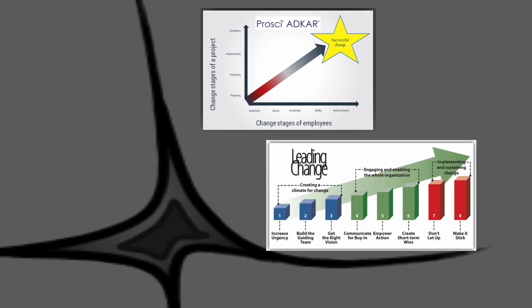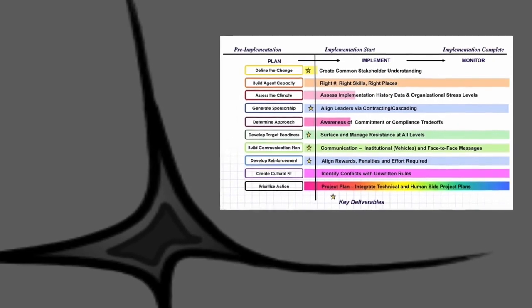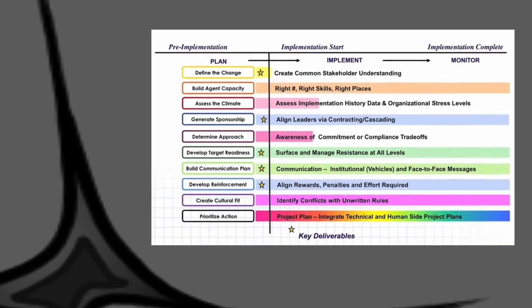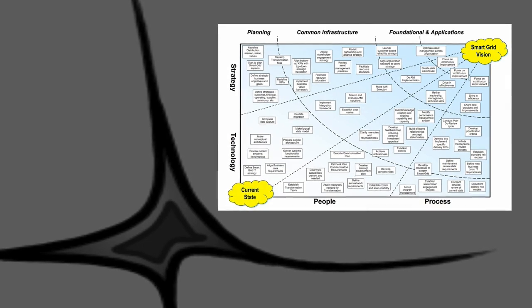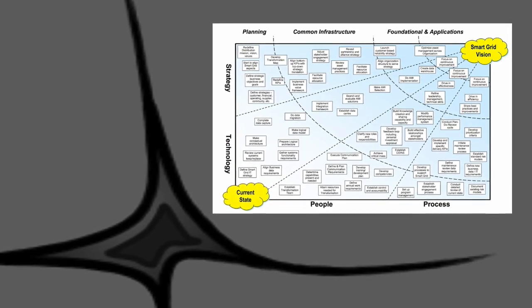They start with an idealistic future and develop a linear sequential path by tracking backwards to the present. A variation adds timing details to create a project management Gantt chart. In this example, I developed a roadmap with an electric utility.